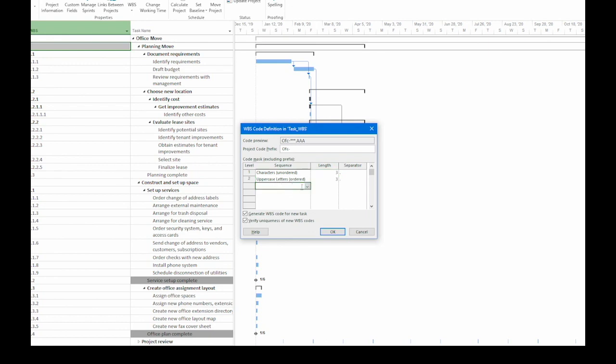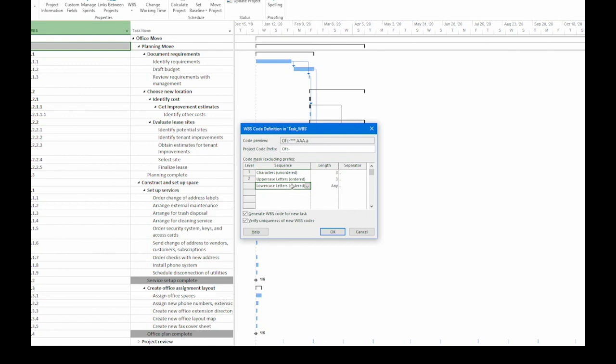Now I go to the third row. Let's make this lowercase letters ordered. Again, these will be going into sequence and Project will increment them as you add tasks. I'm going to change the length to 2. We want to keep the WBS codes relatively short.